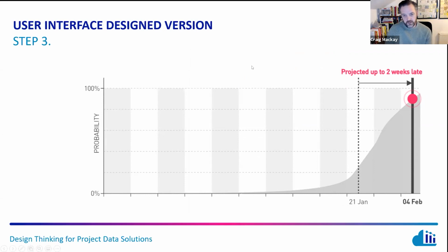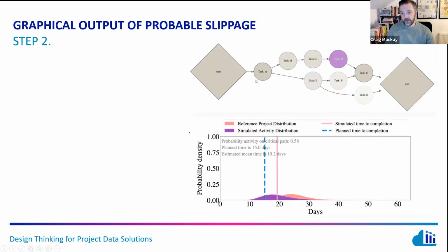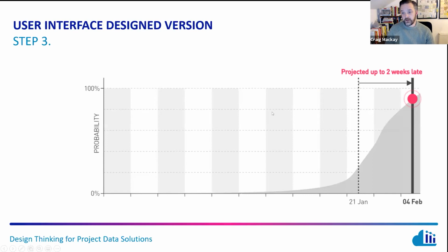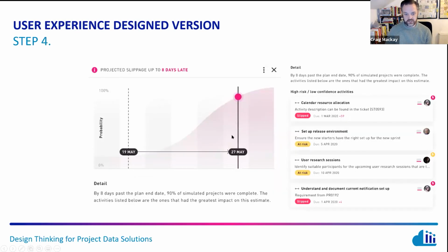What's going on? So the last part is not about explainability of how the machine learning models were working, but actually explaining what is having the impact. So going back to, can I explain this better? We actually then take another step and say, okay, well, that is your slippage model, trying to give you a little bit of an explanation of what's going on, but actually then showing you what's having the biggest effect, almost like an automated critical path for you. And say, well, these activities here in the work breakdown and dependency flow are having the biggest effect. So just go focus on them first. Try planning them a bit better, do some deep dive, and that'll help you. Not saying go replan the whole project and show you all the risks and variables everywhere, because it's just too hard to consume.